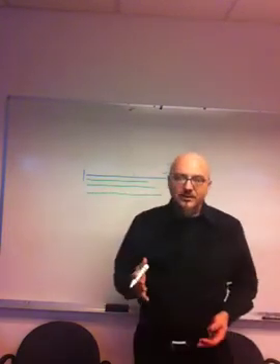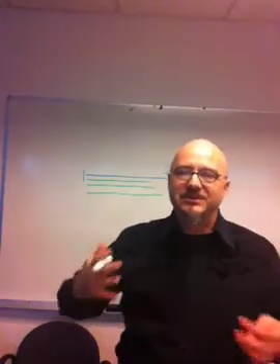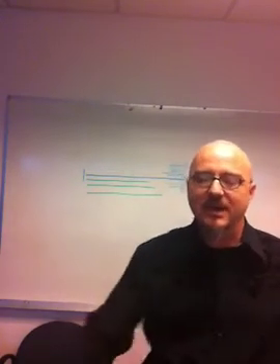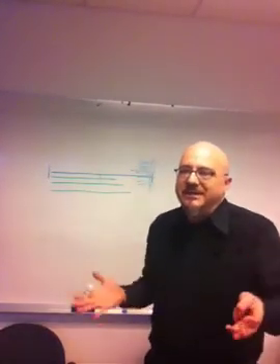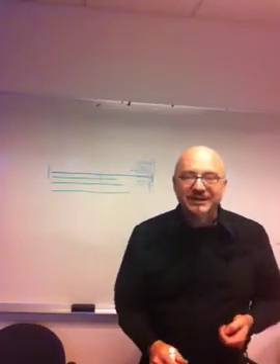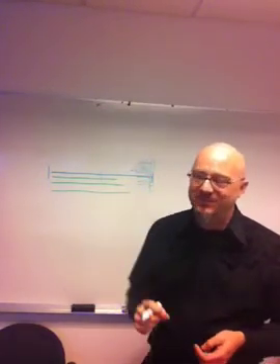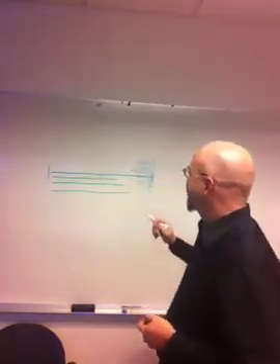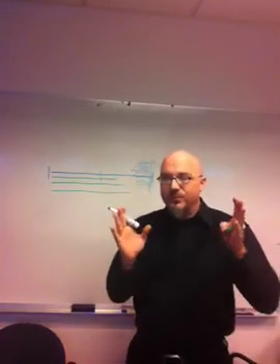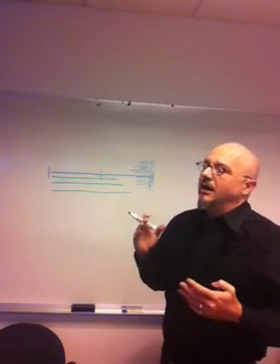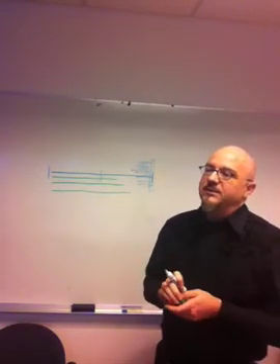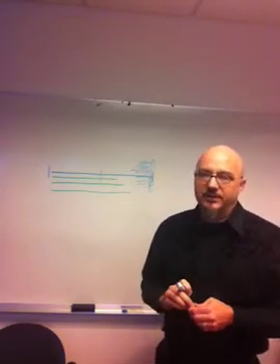Now, granted, you don't want to break stuff down. People just have this tendency, we all have this tendency to not want to break stuff down so small that it's ridiculous, right? That it's so itty-bitty that it doesn't make any sense. But you should. You should really break it down very, very small. And the rule that I've used in the past is that a story should be small enough that it can be completed by one developer in one sprint.